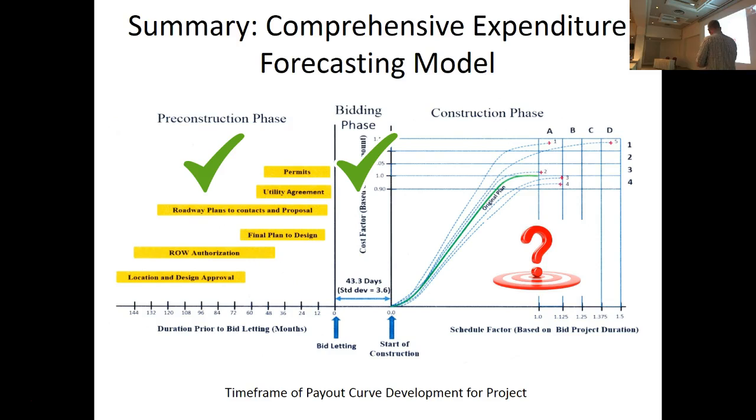But when you get into the construction phase, as we talked about, it's less certain. Even with the best estimating packages and scheduling packages, Primavera and Acumen Fuse and things like that, it's still hard to nail this, because most mega projects are not going to hit their original target, as we talked about at the beginning of the presentation. Only 5 projects out of 100 actually meet their original cost and schedule targets, for various reasons. It's no different for the DOT. They're seeing the same kind of issues happening.